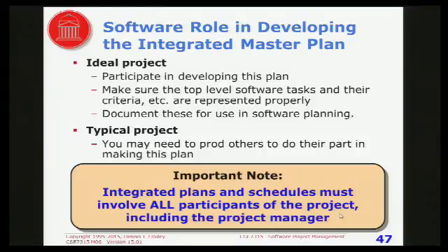So if the project agrees to a schedule, that's a project everybody has agreed to. Now, maybe they didn't all like it when they first came in. A common scenario is the project manager says, I want it done in 6 months, and the technical people say, we can't do it in anything less than a year. And they get together and they work something out, and they have a schedule that says we'll do it in 9 months, because they all figured out ways to come a little closer to what the other ones want.